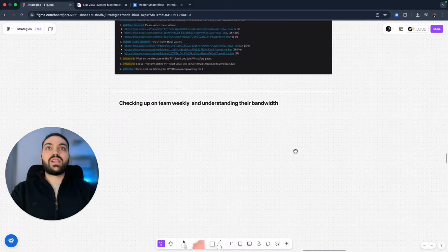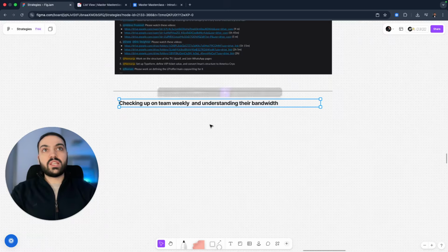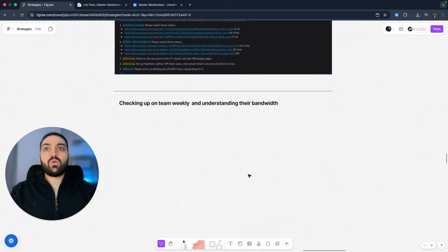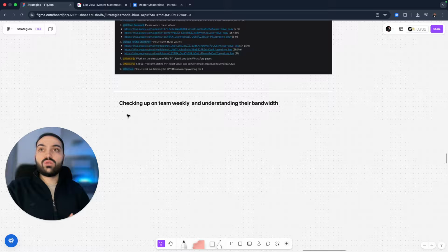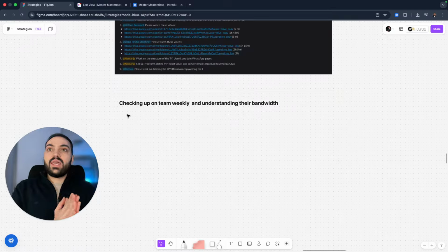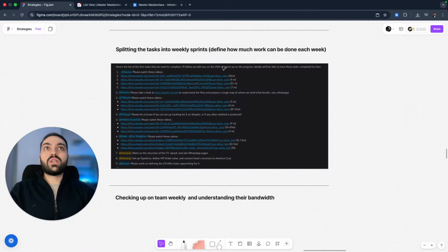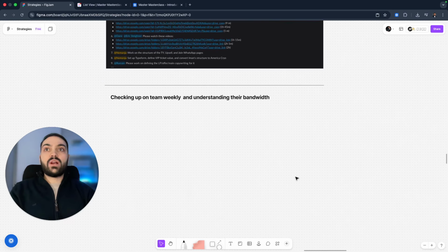And one of the last things that I want to mention is that you need to check up on the team, and obviously understand their bandwidth. I mentioned that you need to understand that even before you head into production, but you need to check up on the team weekly. How are you going to do that? You're just going to send them a Slack message every single week. So if I said that the deadline to finish all of that is the 20th, and I already mentioned that I'm going to check up on that date, they know that they should prepare everything on time.